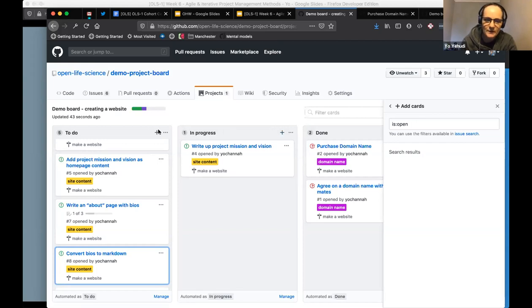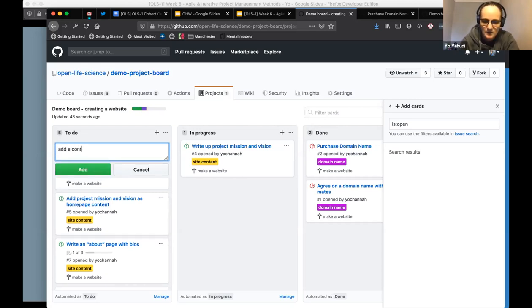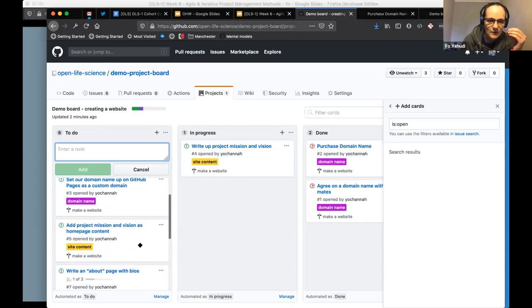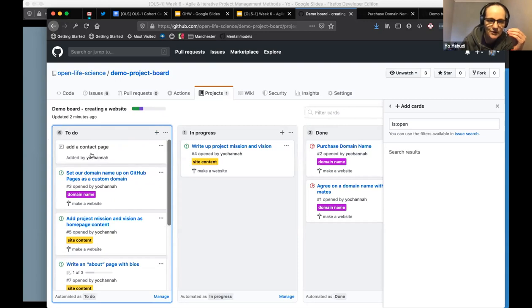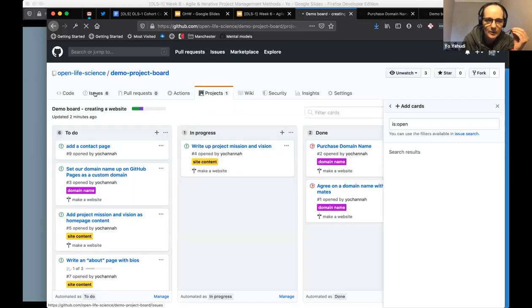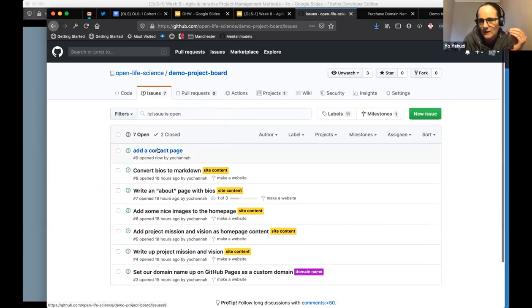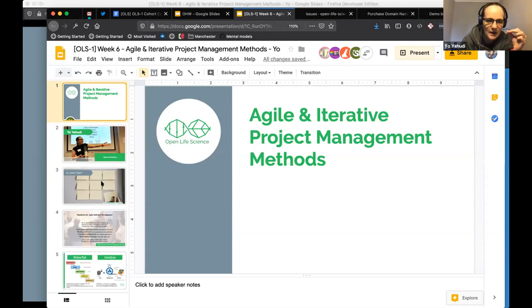If something isn't formal enough to be a full issue, you can add quick to-do notes directly on the board using the plus button — for example, 'add a contact page.' That note doesn't appear in the Issues tab, but you can convert it to an issue later if needed, and it will then show up there. It's a nice, efficient way to manage your project tasks publicly.